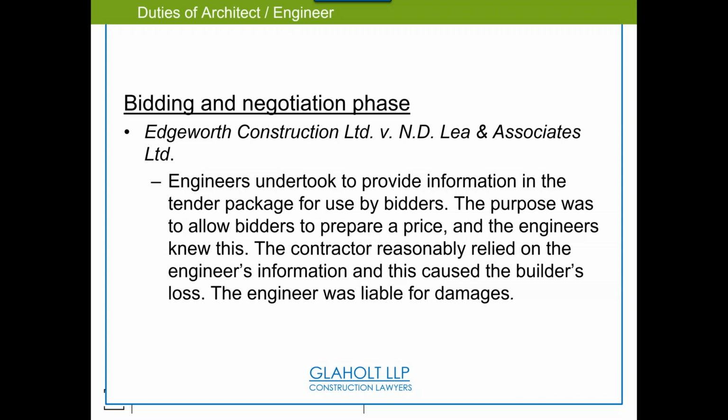Cost estimating versus quantities, and is that for your own risk use, or I'm going to deliver to you that this concrete has 10,000 cubic yards of concrete, and I am going to tell you that as part of my engineering package. Well, if there's 15,000 instead of 10,000, Mr. Engineer, you were wrong, and therefore liable. And that's where they'll say to you, oh, don't give the model because we could be liable. Well, no, but if you say, I'm going to give you the model and you can go and query the concrete, and based on the query, that will be your sum of concrete, therefore price on that accordingly, and you're wrong, yeah, you're liable for that.